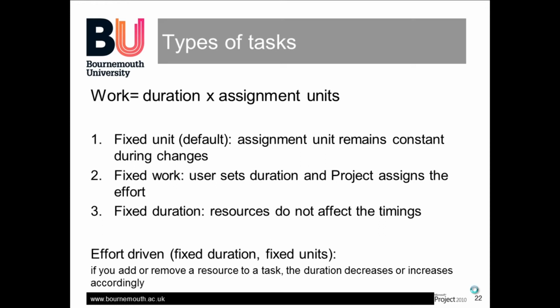And the last concept to consider is effort-driven, and this is an option you can select when choosing your types of tasks. And this is only available for fixed duration and fixed units. So if you add or remove a resource to a task, the duration will decrease or increase accordingly.